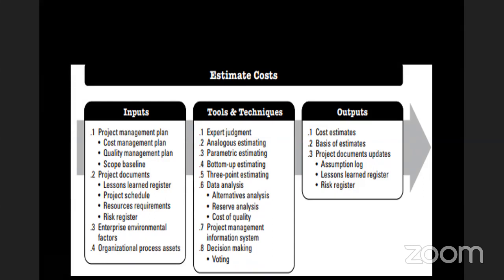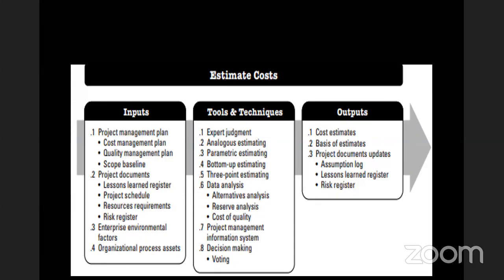Now, if you've done it before, it will then be reflected in your lessons learned register, and that will determine your costing and your scheduling of your costing. So those are some of the reasons why it's very important that your knowledge base be used in terms of estimating your costs.